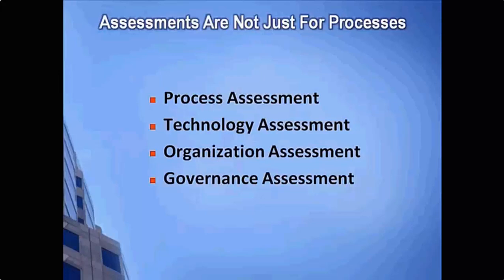Again, our assessment effort will focus on 4 pillars of our solution: process, technology, organization, and governance. We will do an assessment for each one of those. The goal of the assessment effort is to examine our current operational state, compare it against criteria outlined for ITIL good practices, identify the gaps found, and recommendations to overcome those gaps.